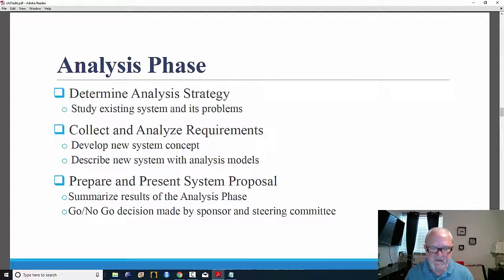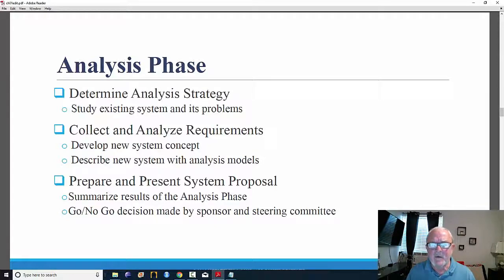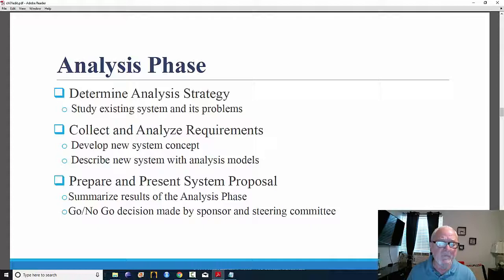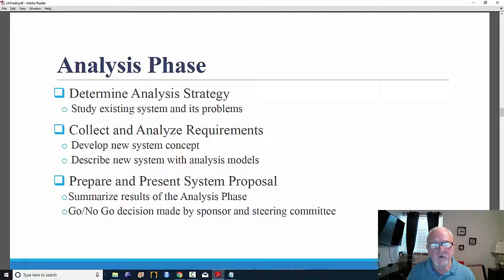Phase two is the analysis phase. Who will build it? What will be built? Where will it be built? When will it be used? The key element of the analysis phase is requirements — what are the business and technical requirements that we must address? What will this information system do? The steps involved are to determine an analysis strategy, to collect and analyze requirements, and to prepare and present a system proposal. Are you redoing an existing system, or are you going to build an entirely new one? This question is addressed in the first step: determining analysis strategy.